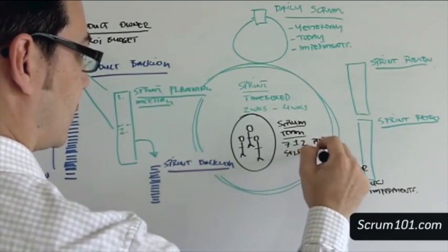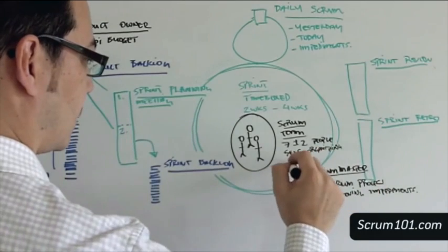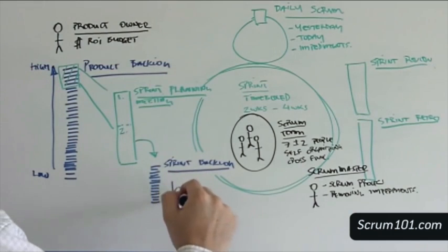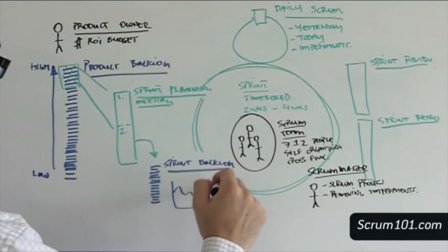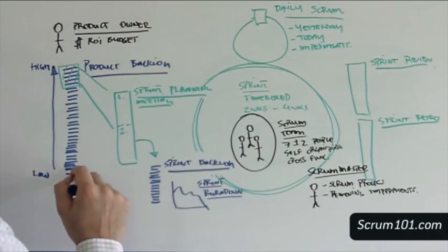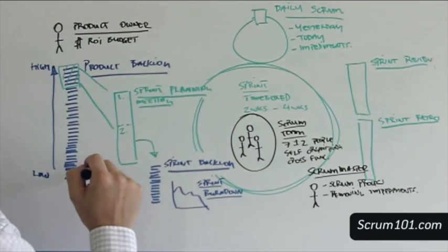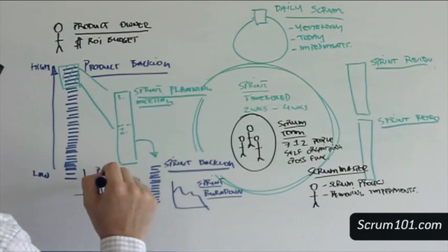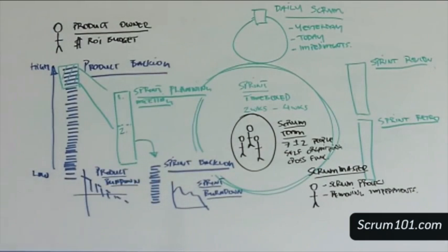Within Scrum, a number of tools are used to provide feedback throughout the duration of the process. The Sprint Burndown chart illustrates the work remaining during a sprint. This is often drawn as a simple line chart. I'm not a big fan of sprint burndown graphs because they can be easily abused. A better graph is the product burndown graph, which illustrates the amount of work remaining in the team's product backlog. This graph is often drawn as a bar chart with trending lines.